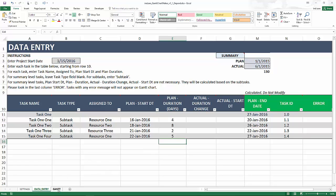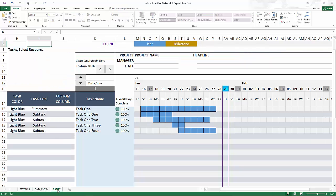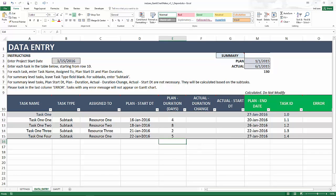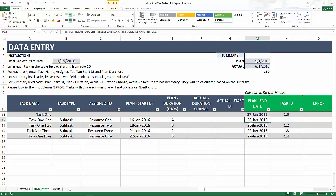Now let's go to the Gantt chart and now we will see that task 1.4 is automatically created in the Gantt chart as we expect and it starts from the 22nd. That's because the end date of this task and this task, 20th and 22nd, the max of that is 22nd and it runs for five days, it goes to the 27th. This is how you can implement the dependency.